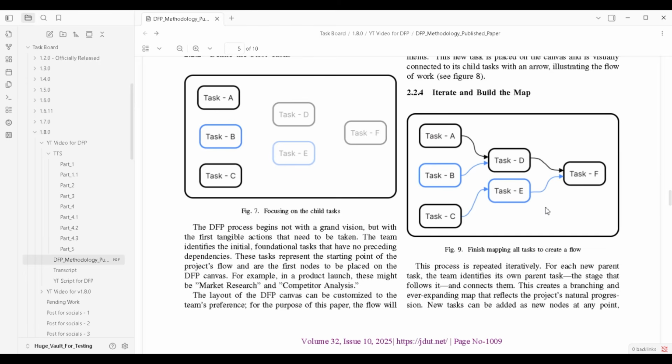This process is actually easier than it looks. You just have to start with the steps and in a few minutes your map will be ready as you think more and more about the execution of the project. Another important advantage is, this flow won't be restrictive. Since it's a live map, you can add a particular task between 2 tasks at any time by breaking the link between them and adding the new task card. And the rest of the map will remain undisturbed.